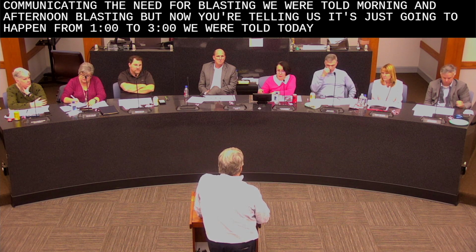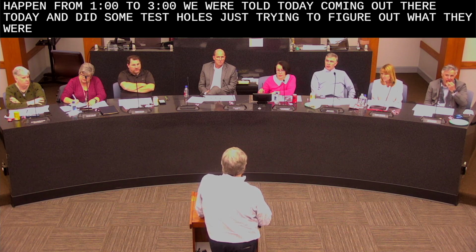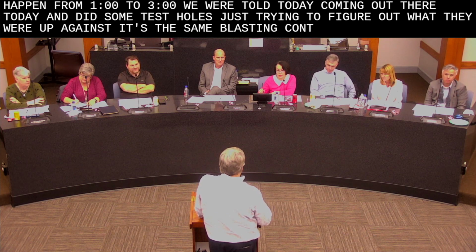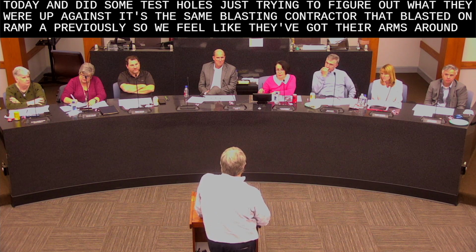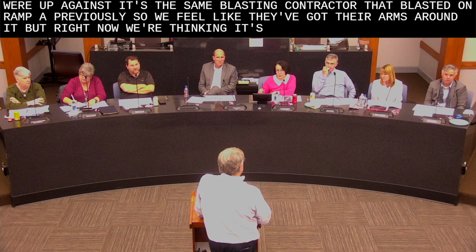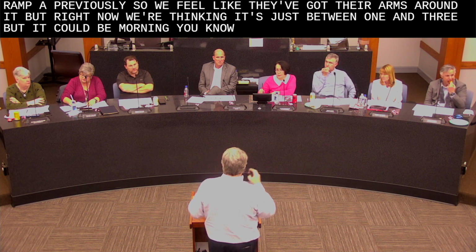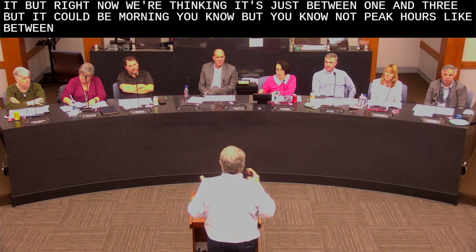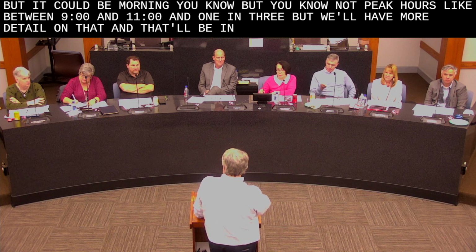The blaster delivered some equipment out there today and did some test holes, just trying to figure out what they were up against. It's the same blasting contractor that blasted on ramp A previously, so we feel like they've got their arms around it. But right now we're thinking it's just between 1 and 3, but it could be morning, but not peak hours, like between 9 and 11 and 1 and 3.